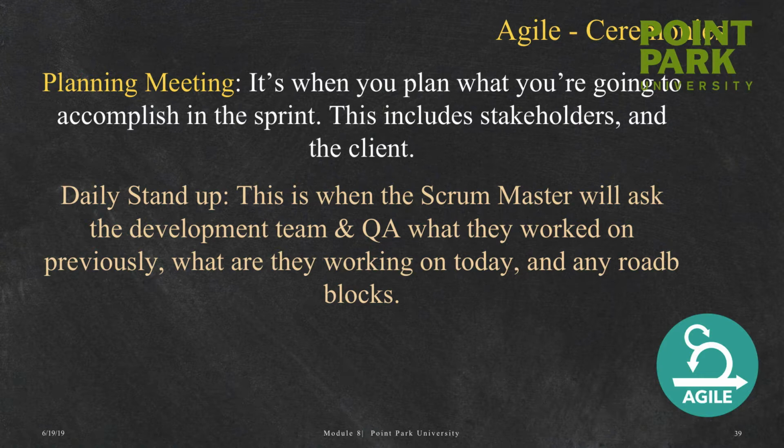These points are the difficulty. So let's say it's a huge thing and you're like, this is definitely 20 points. You put 20 points and you save the big stuff for last, where you could take that big stuff and separate it. Other people can help you out, and you get the small stuff done first. So this planning meeting is 4 hours long. At this point, you've accomplished nothing. Monday's over and it's ready to start Tuesday.